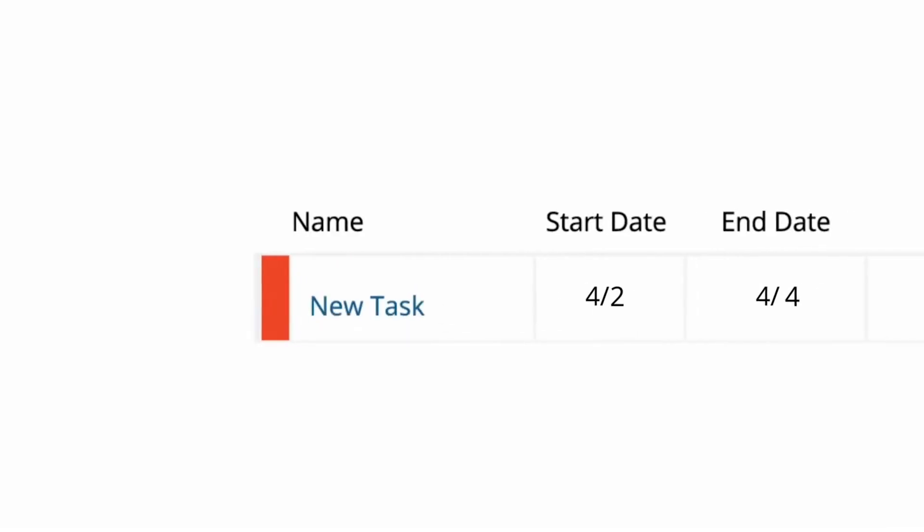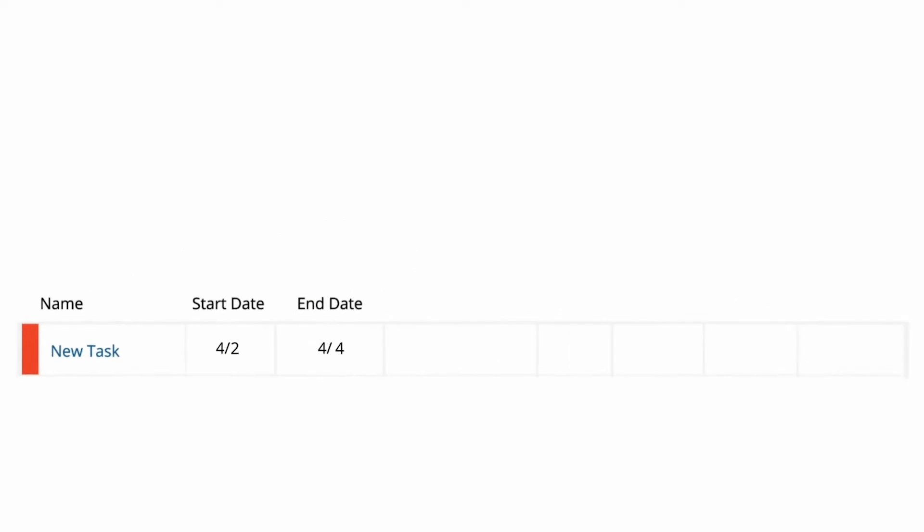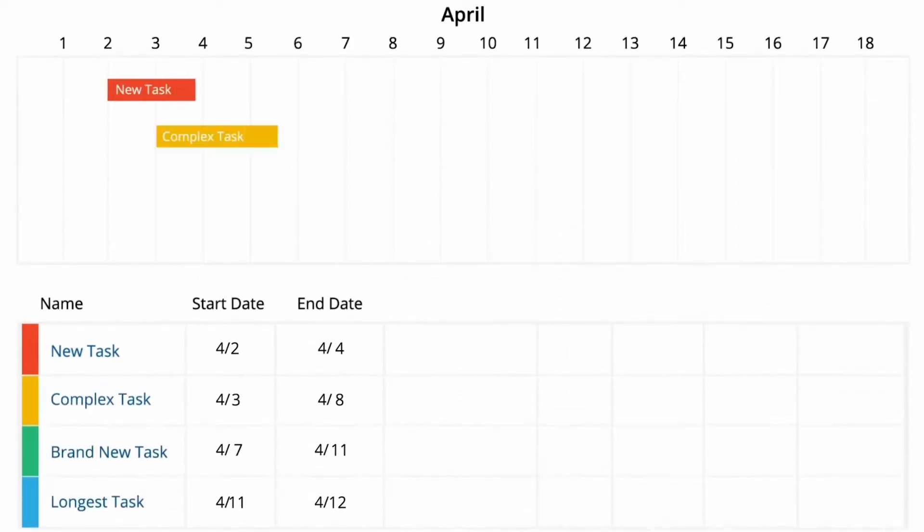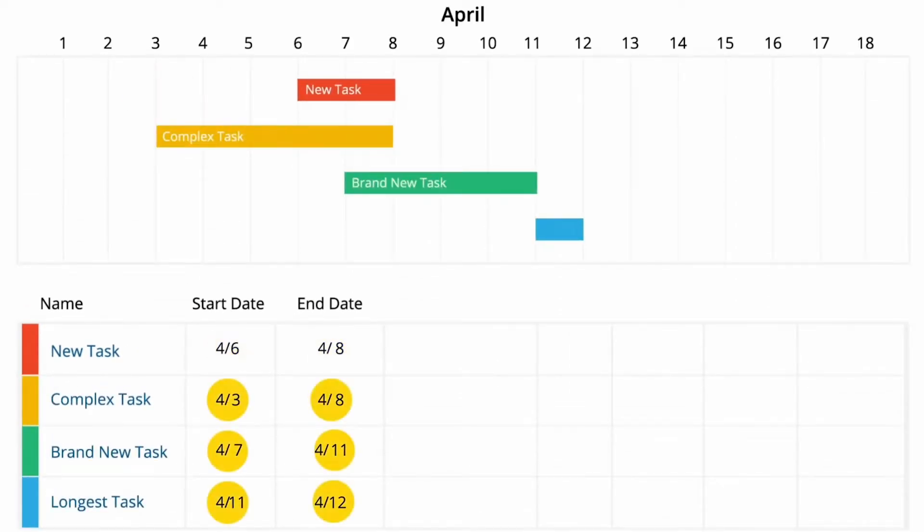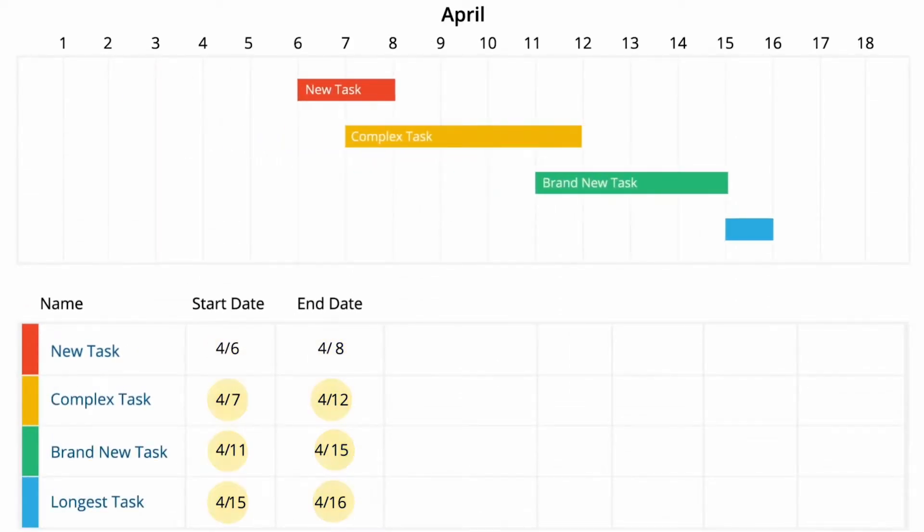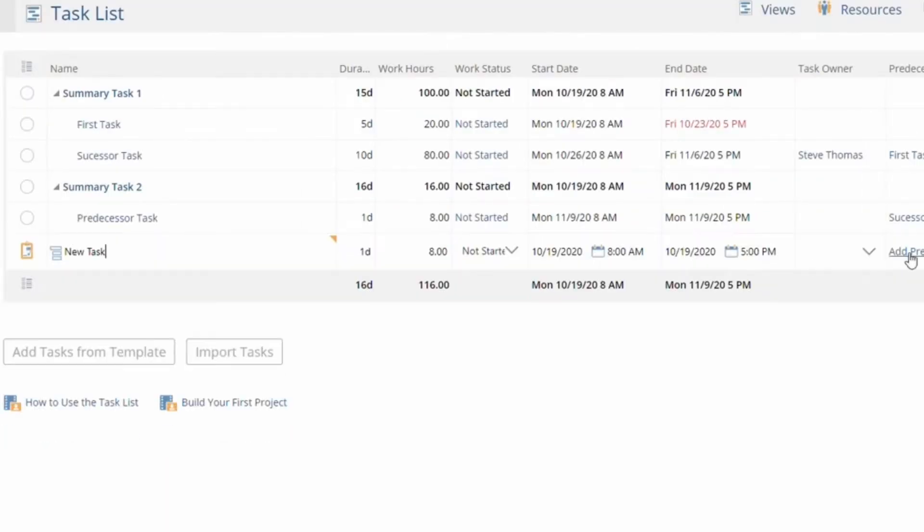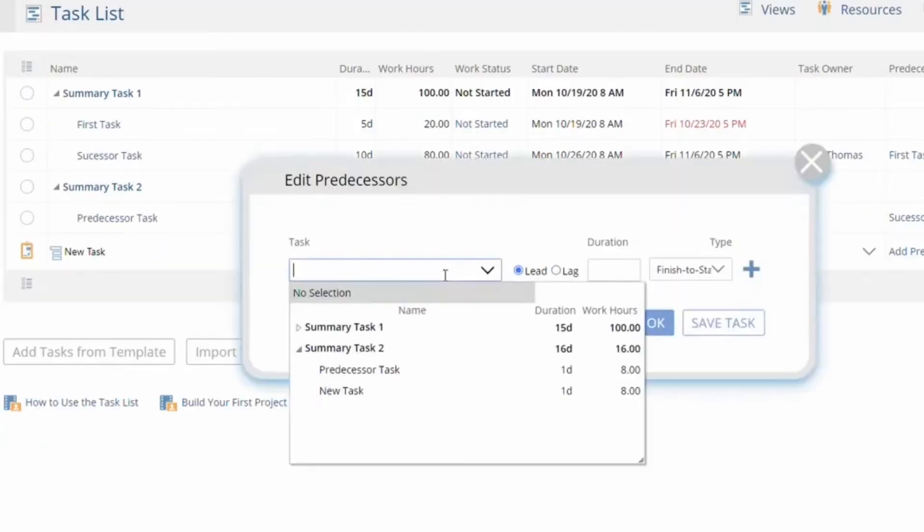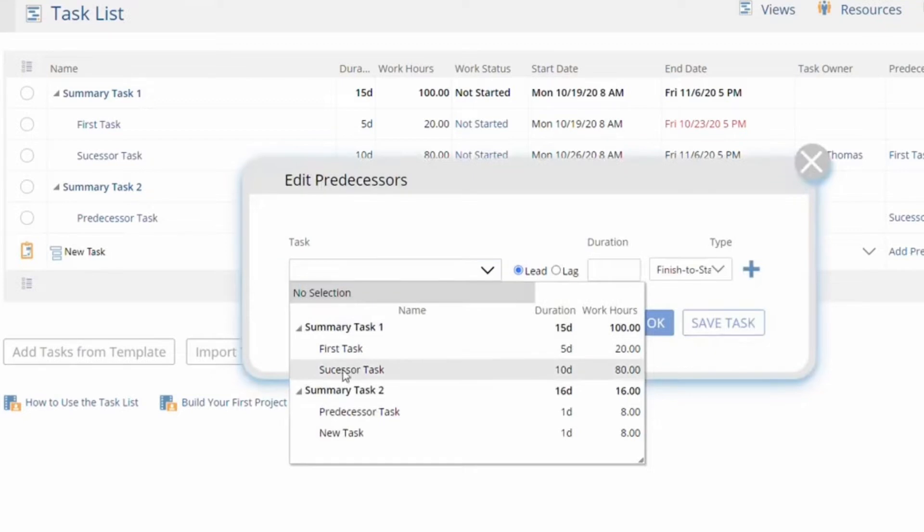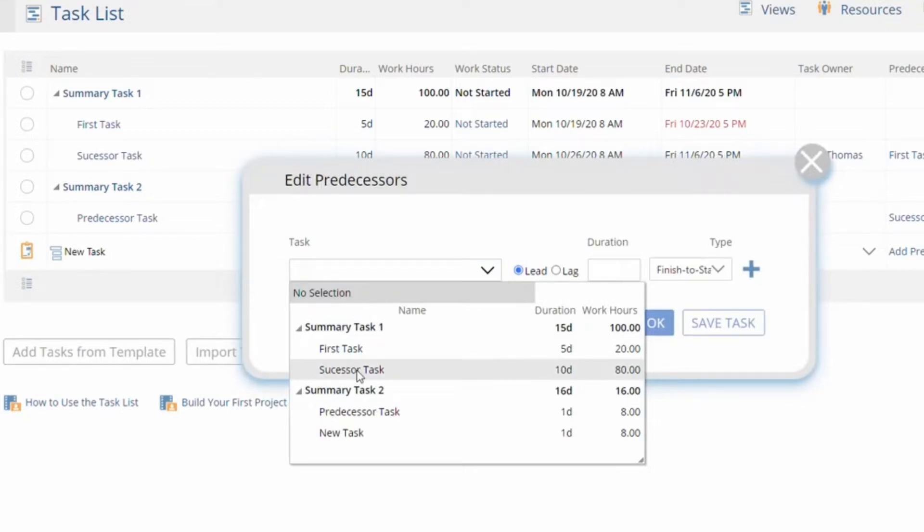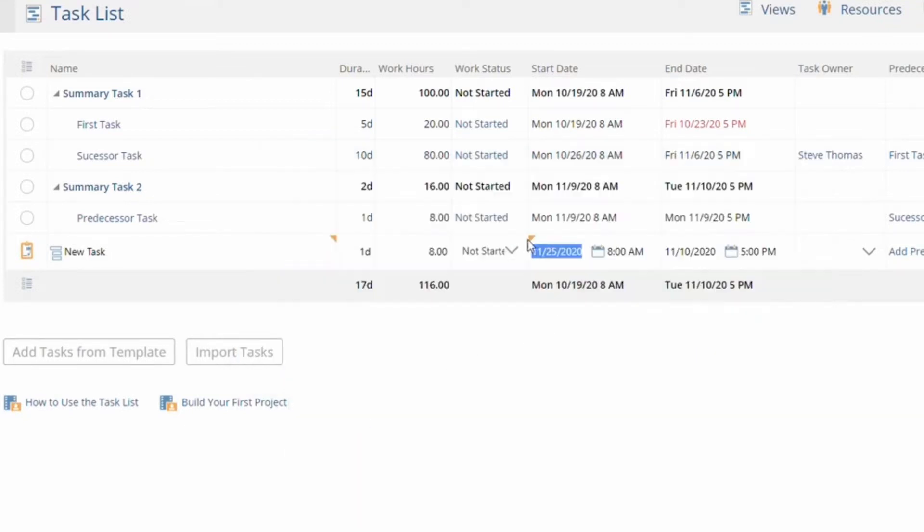Project Insight lets teams automate tasks with dependencies. Users can connect tasks to one another so that when rescheduling earlier ones, the remaining tasks are adjusted automatically. Team members can also shift groups of tasks automatically with predecessor and successor links and the drag and drop feature.